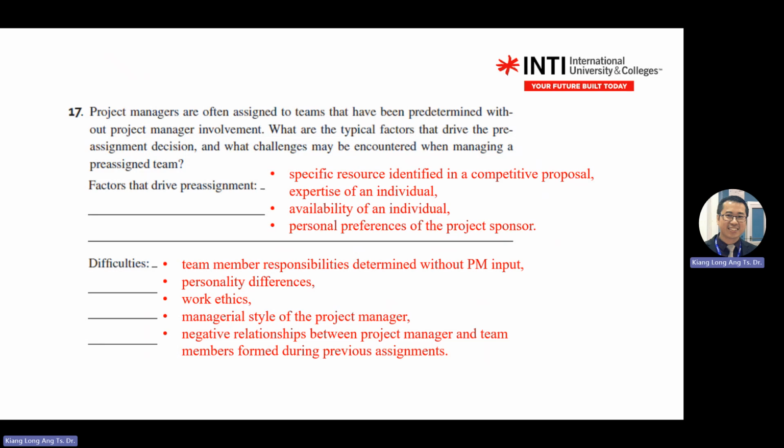Difficulties. Here you might have an issue on the monitoring and control. The responsibility is already determined without your input. Your sponsor already tells that person you only need to do this one. Then when you ask for extra things, the person will come back and tell you, hey, this is not what I agreed.